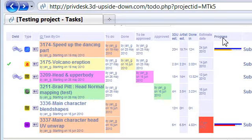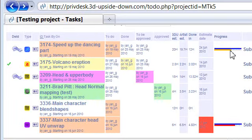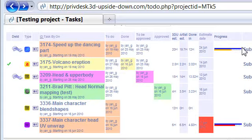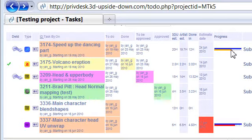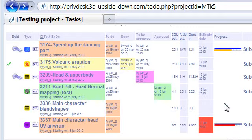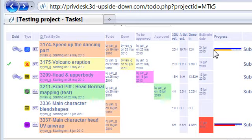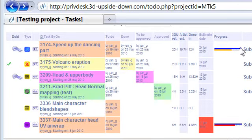This progress column shows you the ideal timing that you need to maintain to respect your deadline. So you can see this blue bar shows the ideal timing and the second bar below it may be yellow, red, or it may also be green. The complete width of this row represents 100% time for the task and the blue bar shows where you need to be. For now it's showing till the end because this task was supposed to be finished.